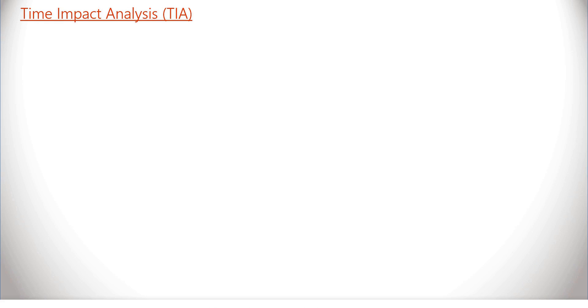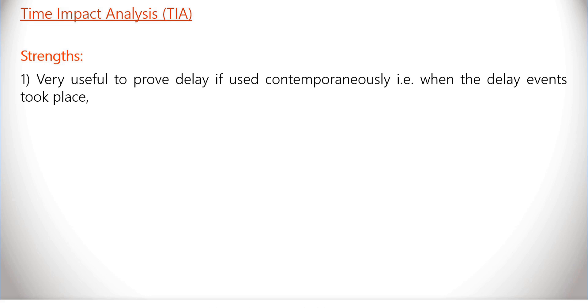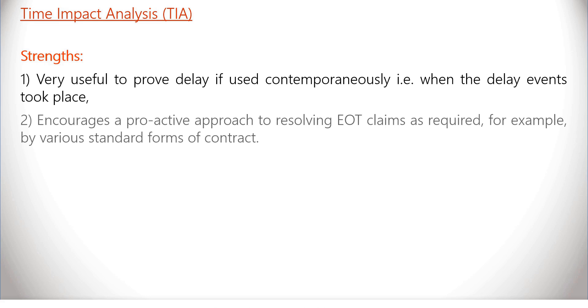Strengths: First, it's very useful to prove delay if used contemporaneously — in other words, when delay events took place. Second, it encourages a proactive approach to resolving EOT claims as required, for example, by various forms of contract.